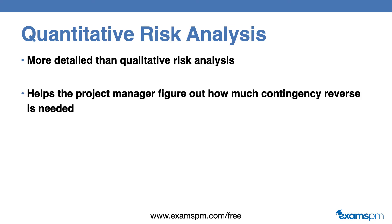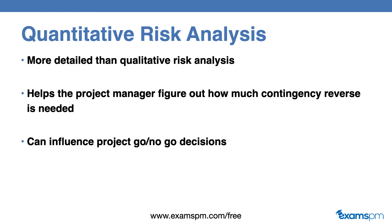This analysis helps a project manager figure out how much contingency reserve they need when managing the project. It could also influence a go or no-go decision — sometimes when the risk associated with a project is too high, the team or the sponsor may just choose not to do the project. You will also include all of the data analyzed from the quantitative risk analysis into your risk register.